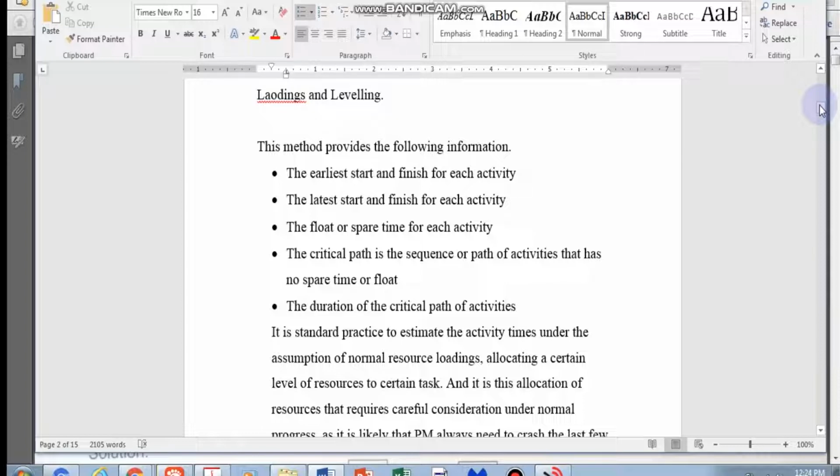Okay, and the other name for critical path method is PERT, P-E-R-T. In many books, they will tell you PERT. In a lot of project management books, they talk about PERT, but PERT is actually dealing with a probabilistic method, meaning that the calculations are based on probability. So that is something we are not going to learn here, but the method of analysis is exactly the same.